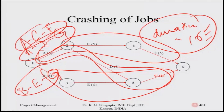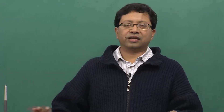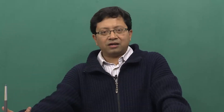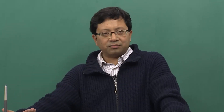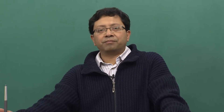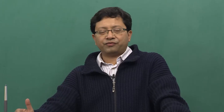The cost consequence applies to C, D, and E collectively. You proceed until no further reduction is possible, then present the full sequence for holistic discussion so that practical decisions can be made. The key question is whether reducing project duration from twenty to fifteen days, with costs rising from fifty-five to ninety-five units, is feasible and worth proceeding with.